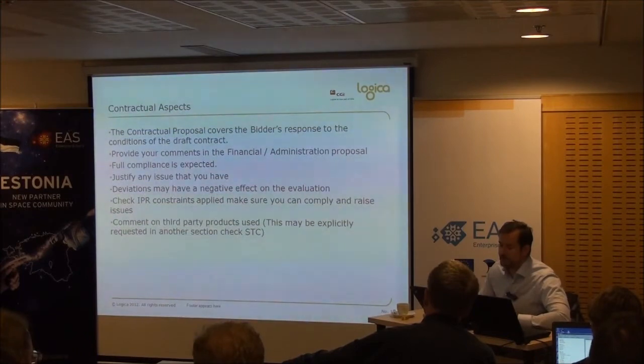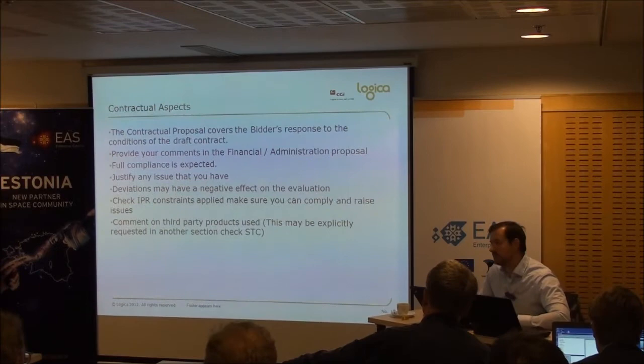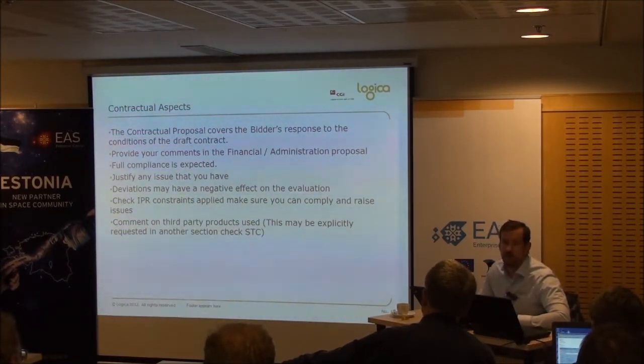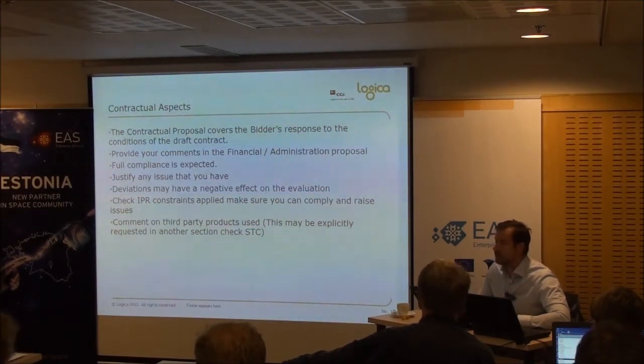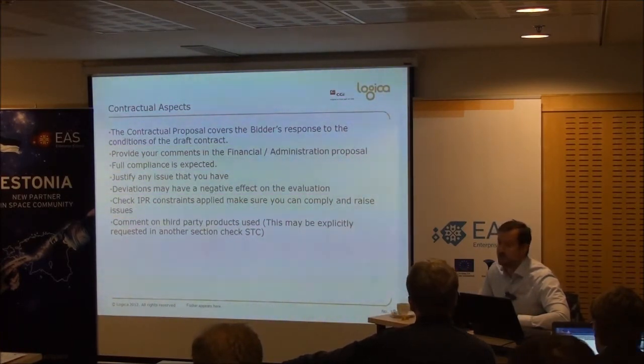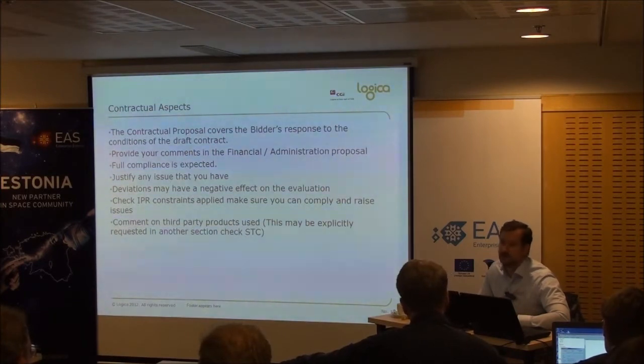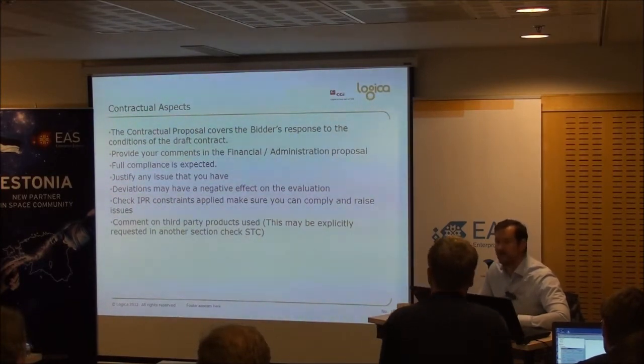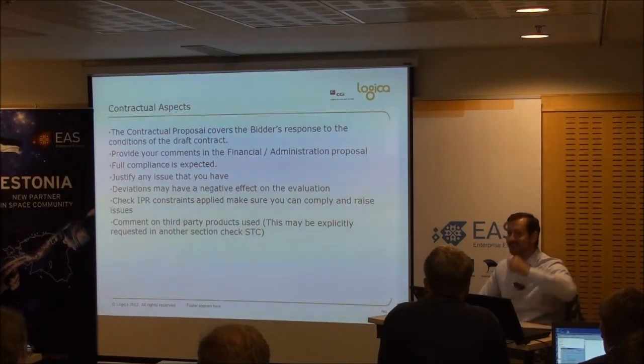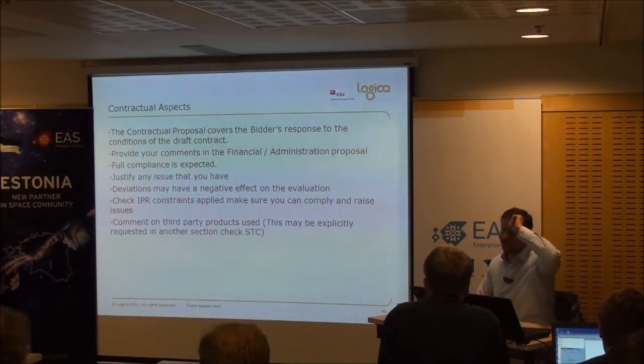You're often expected to comment on the third-party list of products you intend to use, and what type of licenses those are under. Be very wary of any viral copyleft licenses, because that can cause you quite a problem. If you've got some way to automate that, there are software systems today, like Black Duck, for example, that can scan your code and see if someone's been a bit naughty by copying and pasting someone else's code from the internet. And they do check this stuff. So.